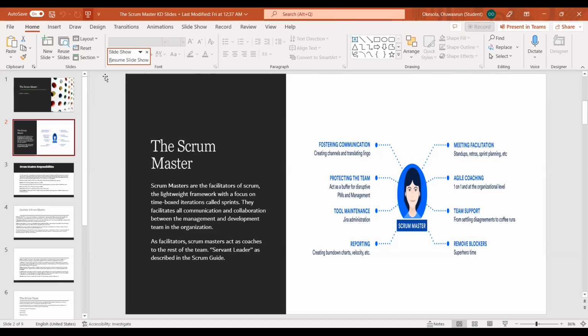For instance, someone is trying to test a product that they've just built and the testing environment is not available. That is a blocker. So the job of a Scrum Master is to ensure that he creates that environment, literally, right? Because he knows they are building a product and they are getting to the phase whereby they will be testing, and maybe the test environment is really not in shape, he should be talking to the lead developer and ensuring that they are working towards creating an alternative test environment, right?